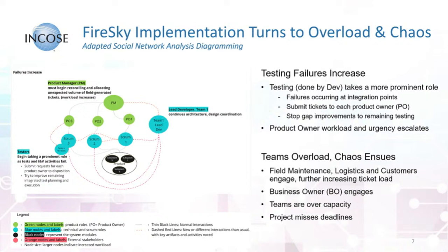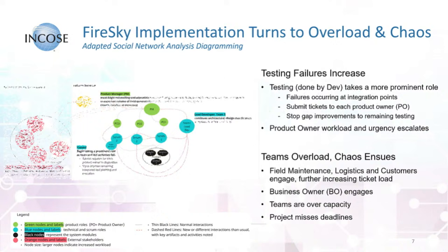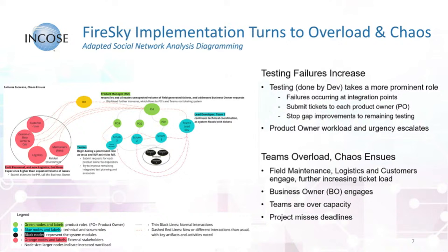to field. So the product owner had worked out schedules with the external sites. Remember, we have 10 of those emergency operation centers and corresponding airfields. And it's a big deal for those operation centers to pause. So of course they need a pause when the new hardware is coming in and software is getting installed. But to do that, they have to transfer the responsibility over to another site. So they're shifting workers, they're changing schedules, they're defining areas of responsibility. So those things could not slip.